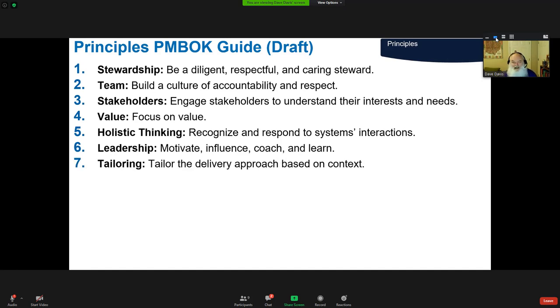Tailoring, based on the context of where we're at, what's the best approach in order to meet our near-term goal? And then you're still going to be looking at rolling wave and goals beyond this one. You're going to be looking at current, next wave, the wave after that, or we can use the term iteration. The project manager is going to be expected to make sure that the teams and organization are focused, the team mainly on delivering the current iteration, but impacting the future iterations. It's going to become more and more a planning role, continuous planning.